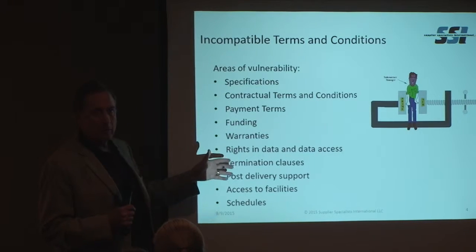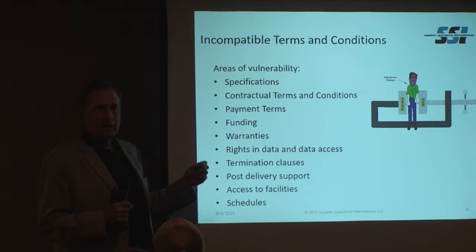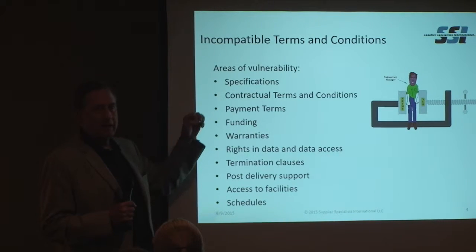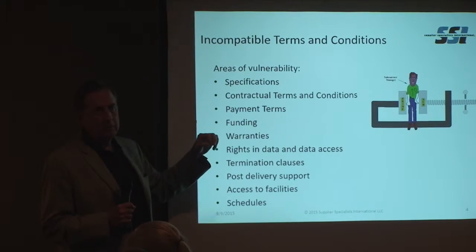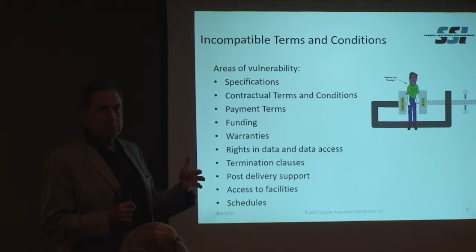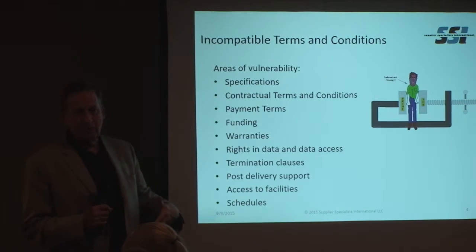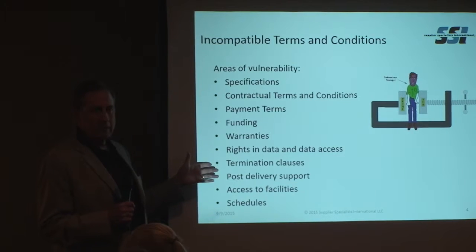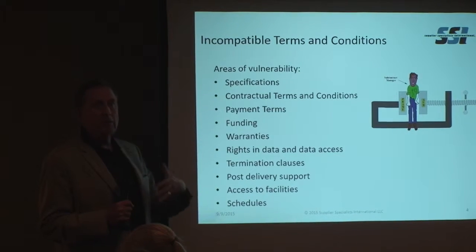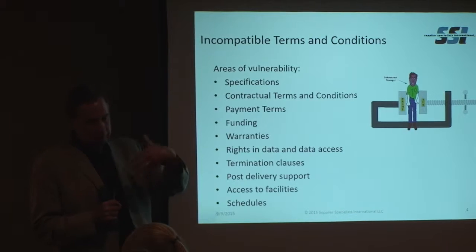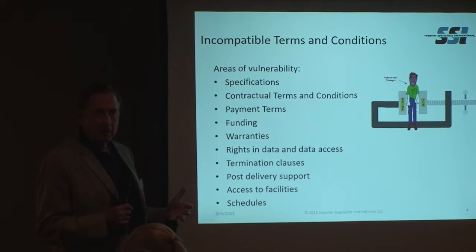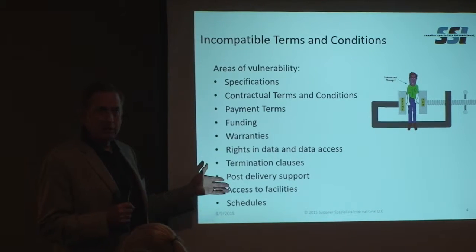Things like data rights, right? Rights to data. The government may flow down a requirement to you that if they've paid for the development of a product, they own the intellectual property. You better flow that down to your subs, and your subs better flow it down to their subs. Otherwise, the government's going to come after you and say, I want all of the IP associated with the software or this hardware, and they could come after you if you haven't flowed it down to your supply chain.